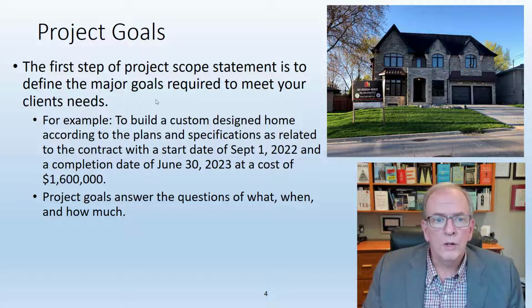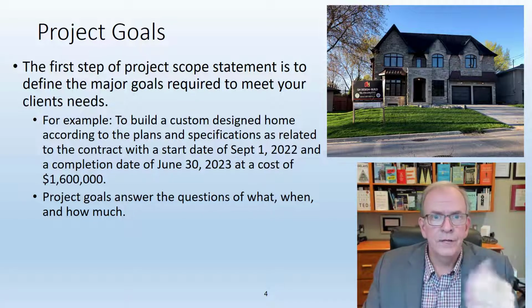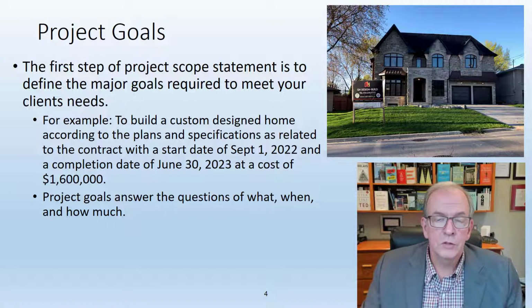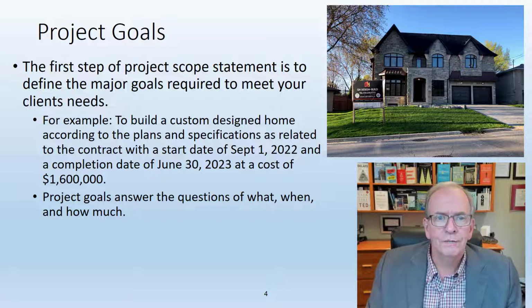So we really want clarity on the goals, and I'm not going to jump too deep into goal definement and that sort of thing here, because I do that in some of my other videos. You can check on the playlist. But if, for example, we're going to build a custom home, you would want to highlight the constraints and goals that we use in construction, which is typically time, cost, quality, scope, safety, those areas that are constraints, but they're also goals. We want to have those really well defined, clarified.